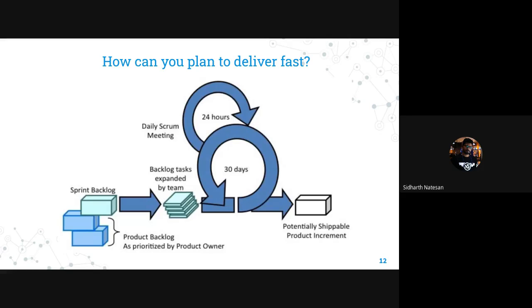If a designer says the work is done, it means the designer has completed only his part. It doesn't mean that the entire task is done. If the developer says the task is done, it means only the development stage is done. If a QA person says testing is done, it means only the testing is done. That kind of practice should not happen in the Agile methodology. In lean, we have a rule called definition of done.